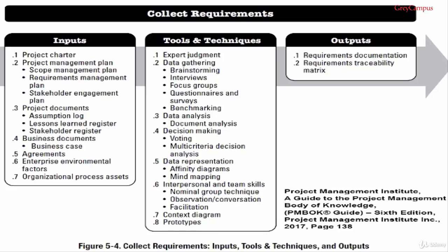Project requirements in previous similar projects, so they can apply a reasonableness check to the requirements and perhaps even suggest missed requirements. Diagramming techniques, so they can present the information in a meaningful way. Facilitation, so they can assist stakeholders and the team to work together efficiently. And conflict management, so they can prevent the stakeholders fighting over requirements. On a medium to large scale project, it is extremely unlikely that you will find one individual with all of these skills, and so you're really looking for a group of people or a team to make sure that all